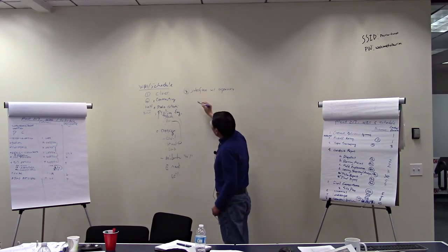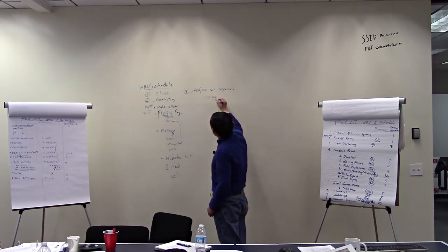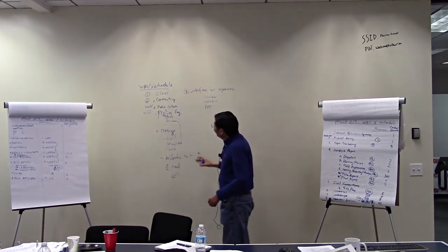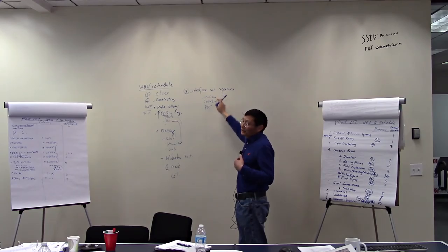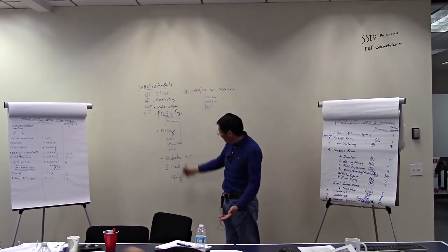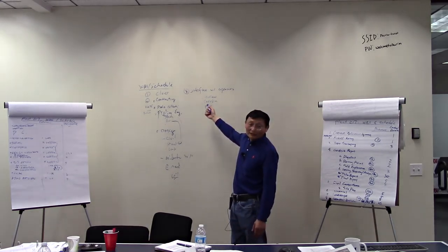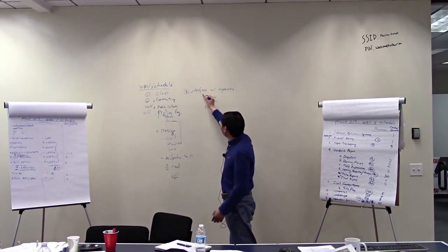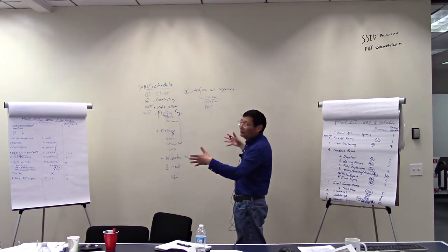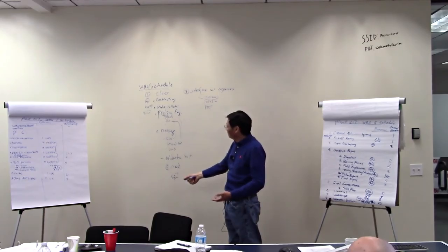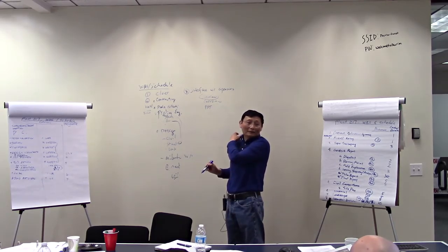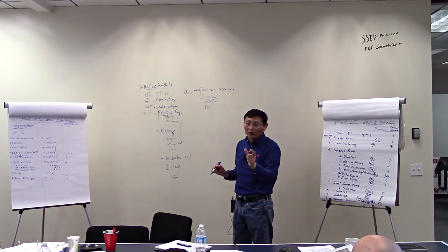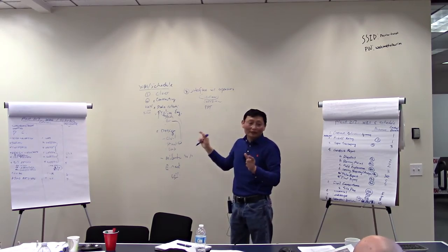So the third thing that usually gets missed is the interface with the agencies. For example, reviews. For example, coordination. For example, PDT meetings, all of those. If you recall in the scope of work, we don't really have a cost item per se for reviews. We just say we'll submit a 60% milestone, we'll move on to 90% design. But in the schedule context, this has to come in. A window of time needs to come into a schedule. In the scope of work, it didn't really have that presence.